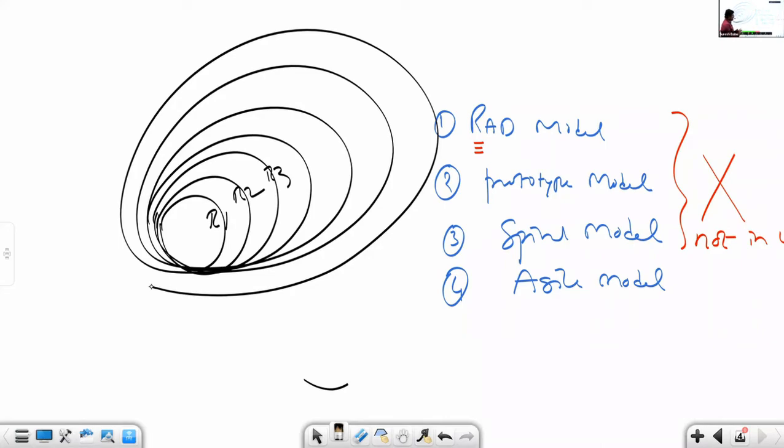The prototyping model's advantage is that first we demonstrate to the customer what we are building for them, then we build. In the spiral model, rather than implementing multiple requirements in one schedule of 2 months, it is 2 days, 1 week, maximum 10 days of schedule, and the system gets implemented requirement by requirement. Nowadays applications have frequently changing business requirements. Today the customer will say they want something like this. Tomorrow the customer may change it, because in competitive business, strategies change very frequently.